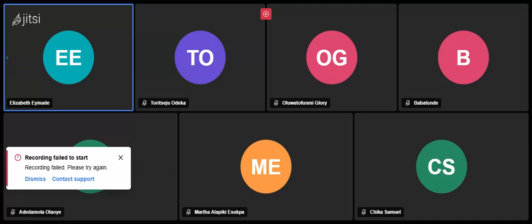Now prioritization comes in when you say, okay, I have 50 items on my backlog. So how do I prioritize? Now you start prioritizing how it should go. For instance, you want to build a fintech app, the first one should be sign up, from sign up to login to forgot password to the dashboard to the core fintech product, which I talked about when you're using your North Star metric to measure. That's the core product, which is sending money. So you do all of this according to the order of importance. You have a list of all the features now.